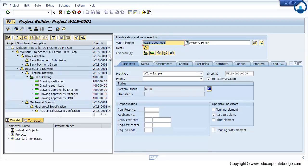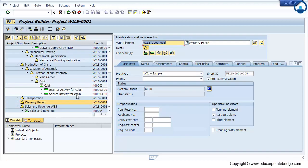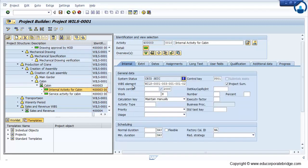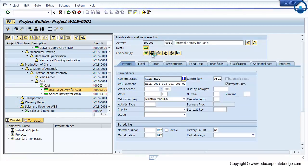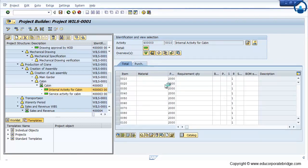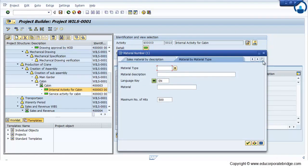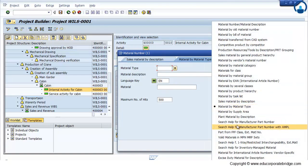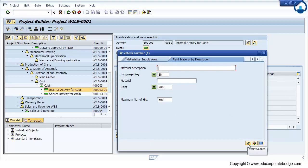If I want to assign some material on the internal activity, for example, internal activity for cabin having some material, so I just select that particular activity and I click on the material. I select material by plant. I can able to find out what are the material are present in that particular plant, that is 2000 which I am using.